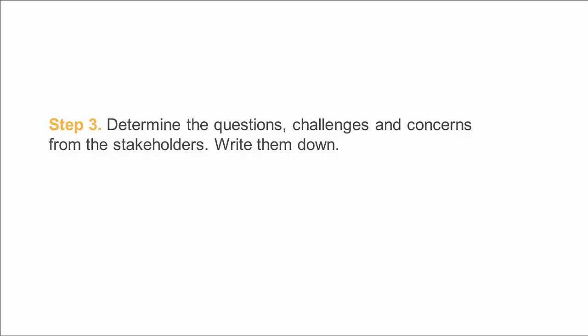Third, we like to do this with sticky notes when we do these live, and it's actually a good technique to get what we call the voice of the customer. So really, what is the specific thing that these stakeholders are raising? Determine the questions, challenges, and concerns from the stakeholders and write them down. Sometimes it's just a question, and questions can be simple feasibility questions. Well, I don't know if we can do this. I'm not sure about blank.